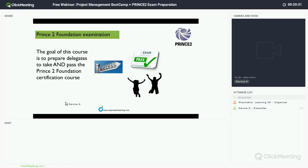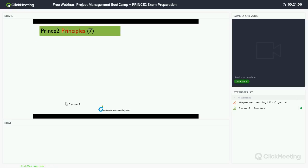We'll talk a bit about Prince2, and we'll go into some of the things that will be handled in the Prince2 certification exam. Prince2 has 7 principles, and the 7 principles will be covered during the certification course. The first principle says that every project must have a continued business case justification. The business case is the why, the reason why the project has been commissioned and started. And Prince2 holds a tenet that every business case must be written and must be documented.